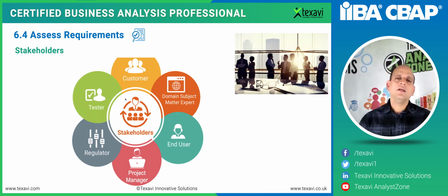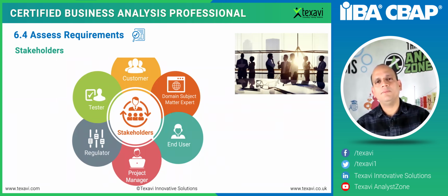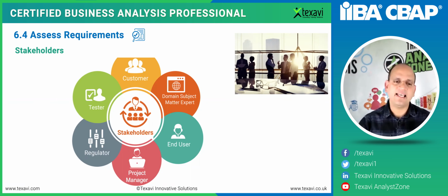And then testers, QA, play a significant role. The development team, plus the testers, play a significant role in making sure that the changed requirement is incorporated into the new build or not. They would be doing the regression testing, for example, to assess the impact of this particular change on the overall set of features that we've already got into the build that we have delivered or have ready.